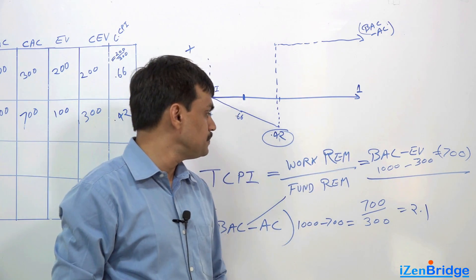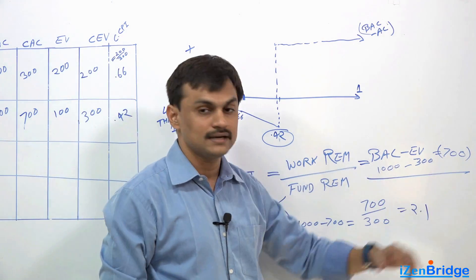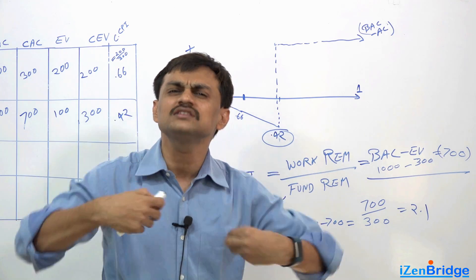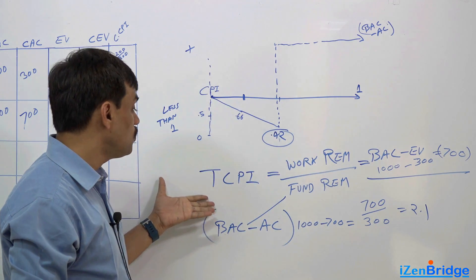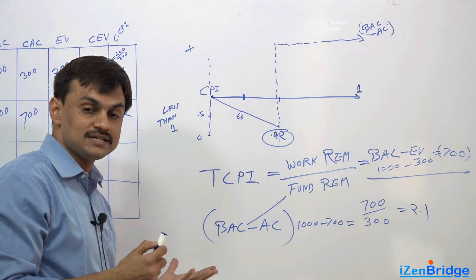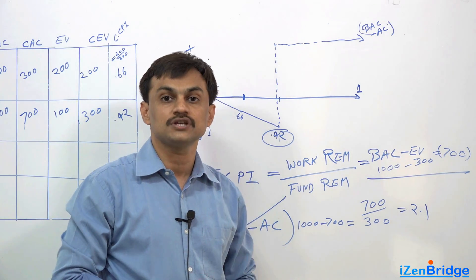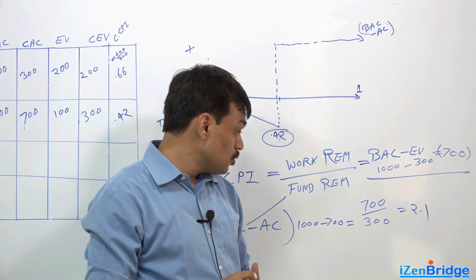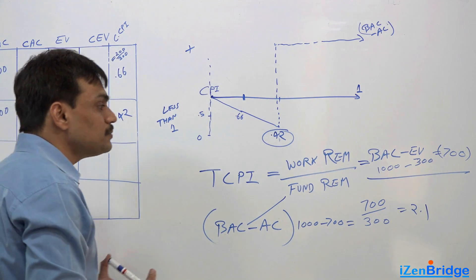Now the second possibility could be: looking at the situation, manager says okay, you have work left of $700, let me give you $1000. So then you have a new fund remaining. You have a new estimated completion. It says that the current estimated completion, which the budgeted completion was $1000, looks difficult. So why don't I give you a little bit more money?